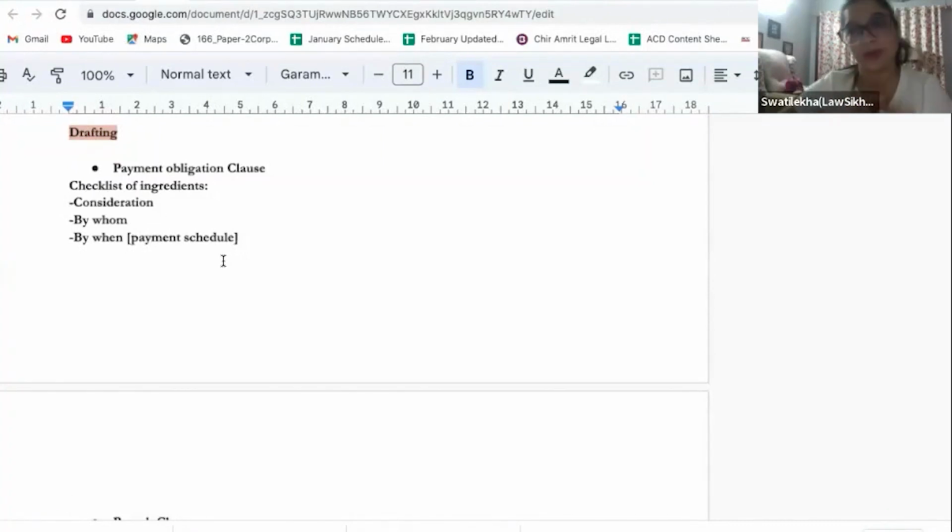Either payment can be made one time. For rent, I will pay 10,000 within the 5th. Or I can break it up: 5,000 I will pay by the 1st of the month, and the rest 5,000 on the 15th. That practically doesn't happen, I'm just explaining. These are 2 tranches. Commercial agreements are worth almost 50 lakhs, 1 crore, 2 crore, so there is always a schedule or tranches of payment: by the first schedule, this much amount will be credited by this much time. This is called the payment schedule.